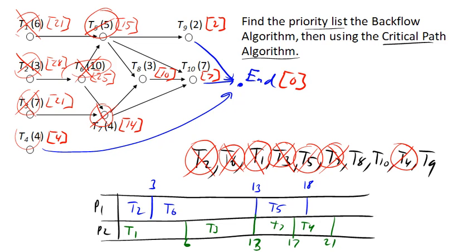And now at time 18, task 5 gets completed. And both of these are done, so task 8 and task 9 are now ready. So we can go ahead and assign task 8 here. Task 8 has a time of 3, takes me out to 21.